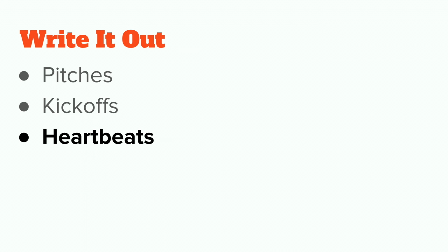So while kickoffs happen at the beginning of a cycle, the bookend of that is heartbeats, which happen at the end of a cycle. Heartbeat is just a term that we use to describe the conclusion and reflection on the cycle. So every team at Basecamp does this. For heartbeats, we outline what we worked on, what we accomplished, what we failed to accomplish that we had in our original kickoff, any challenges that came up, any emergencies that may have come up during the cycle, whether it was a serious crash issue that we just had to stop things and set stuff aside and work on a new thing. All of that stuff is outlined in our heartbeat.